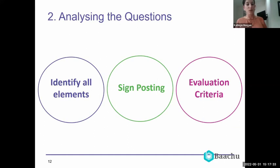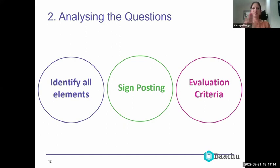Next is analyzing the questions — another really important part of storyboarding. We want to identify all elements of the question and turn them into signposting within our bid response. Signposting acts like a signpost for the evaluator as they read through your bid — it tells them where they are, what part of the question is being answered, and where to find the next part.